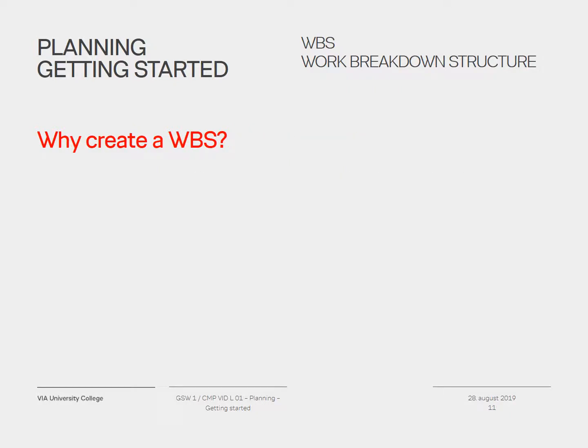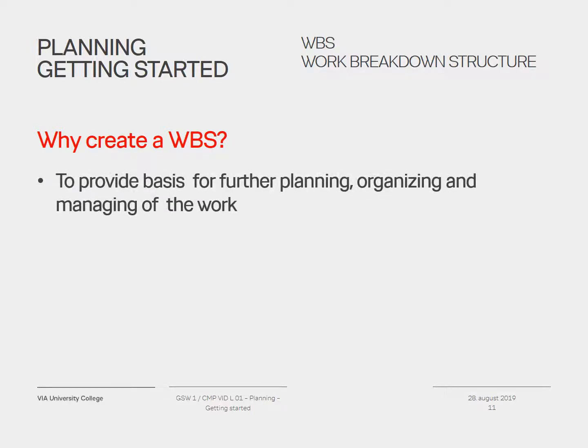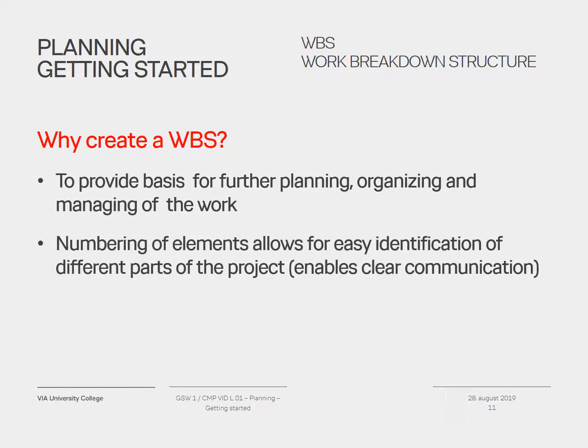So why bother creating a work breakdown structure? While in itself maybe it's not very useful, the work breakdown structure is a key component in the planning process. It gives you the basis for further planning, further organization, and managing of the work. If you have a large project, it allows you to number the elements in a logical way and easily identify different parts of the project. That enables clear communication on large projects where you're not alone, where you are working together in a team.